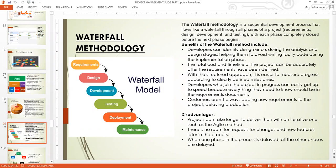There is no room for requests for change and new features to be added later in the Waterfall process. When one phase in the process is delayed, all the phases are delayed. These are the disadvantages of Waterfall, and these disadvantages are very severe.